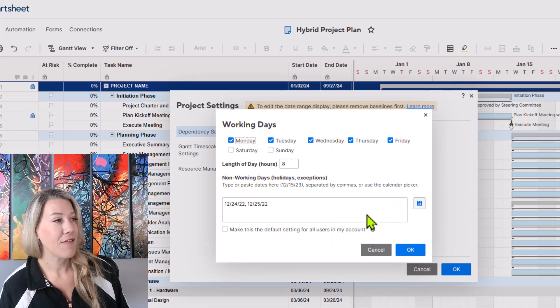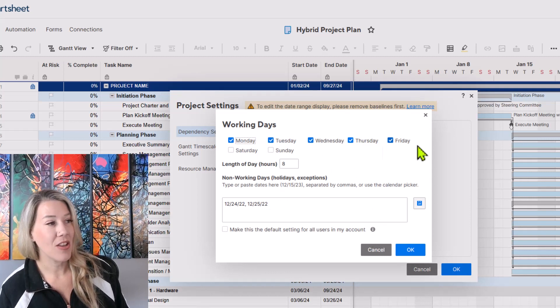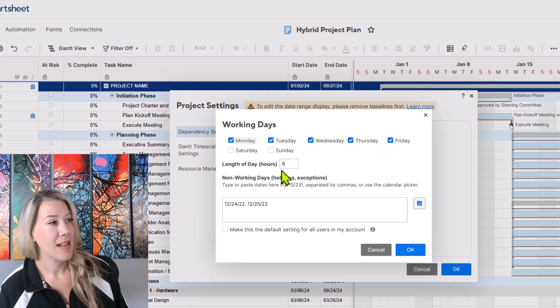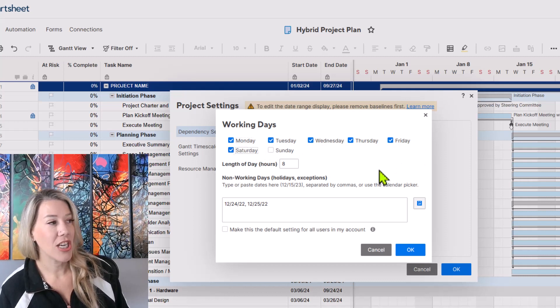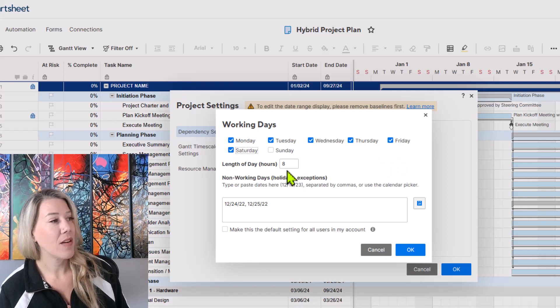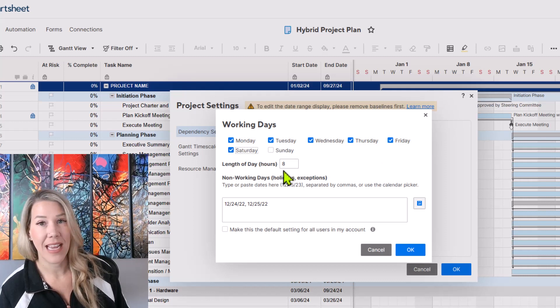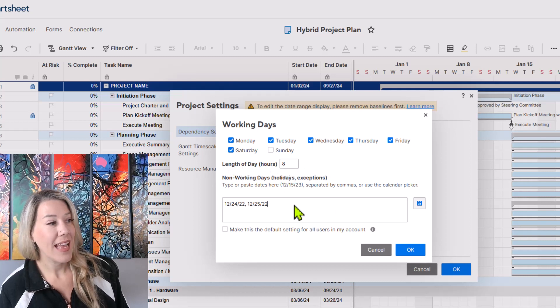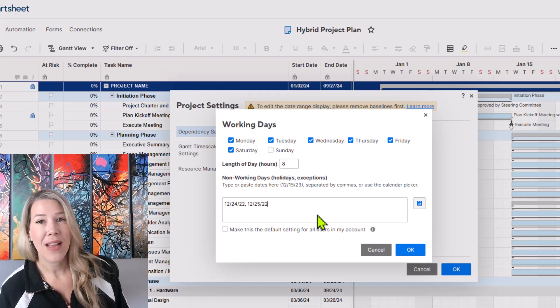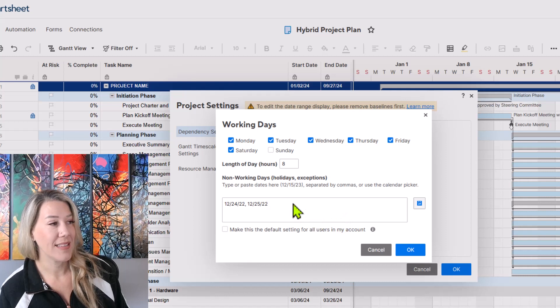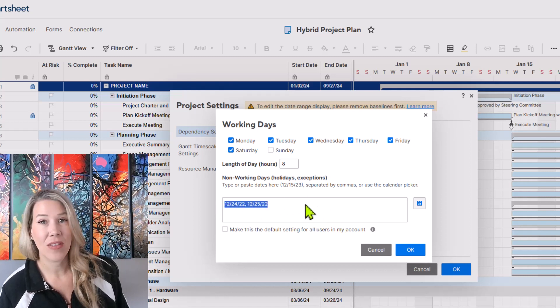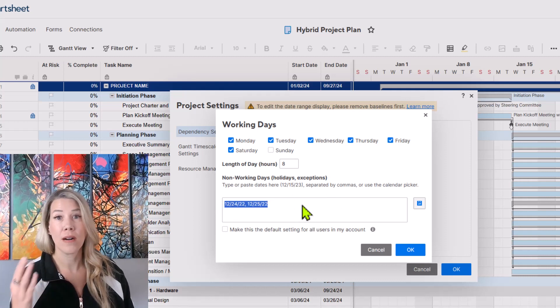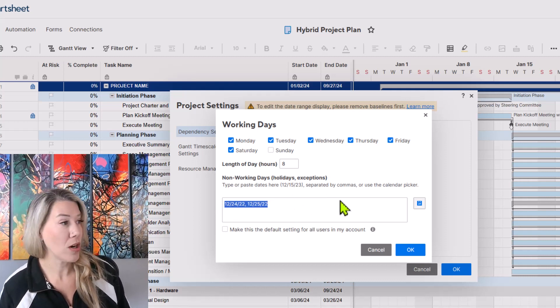If I click edit, you'll see it shows Monday, Tuesday, Wednesday, Thursday, Friday checked. Let's say we're now going to be working on Saturday. So I'm going to check Saturday. It also allows you to adjust the length of days as far as hours and you can manually put in here some of the non-working days. So you can manually insert those for the holidays that your team does and does not work.